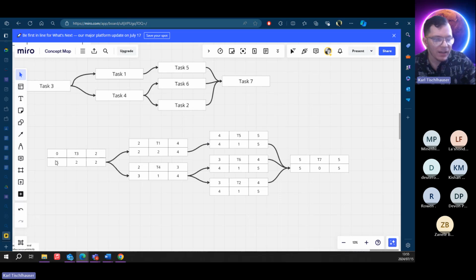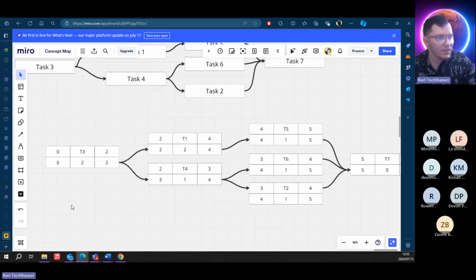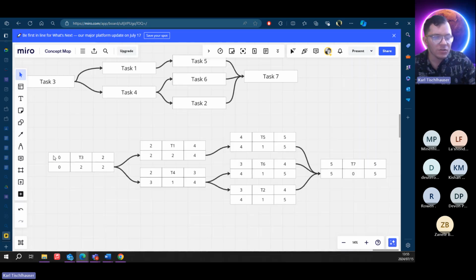If you come back and you don't get a 0 on this, in this corner here, in this square, you've done something wrong. Okay, you must always start with 0 and finish with 0 on your first block. If you don't, then it means there's a calculation error.